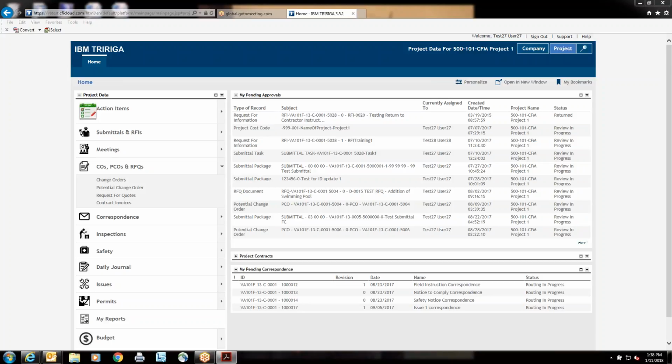Another heed of warning is if you make a mistake in the money amount or budget code and you've already issued or completed it, you have to email the field support staff to get their assistance to fix it. So we'll go through those steps. We'll identify how you start creating that change order. Your manual has all of this information to get to the change orders.